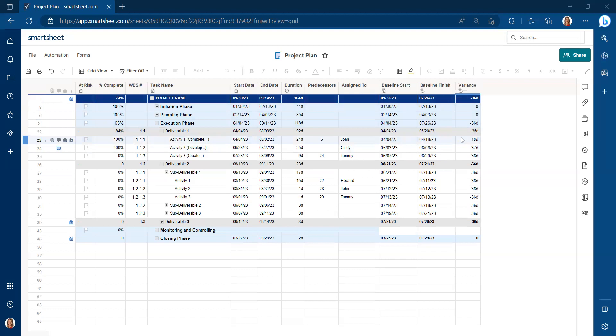If it's a negative variance, it is behind schedule. So you can tell row by row if you're ahead or behind schedule.